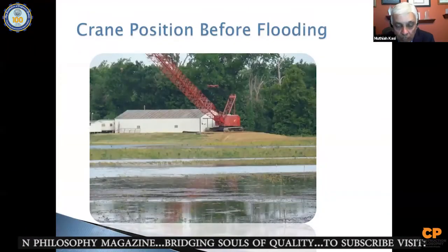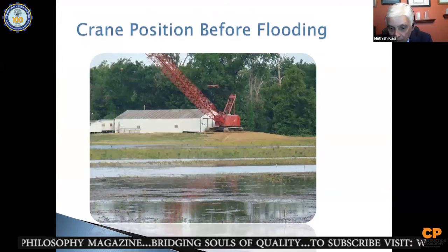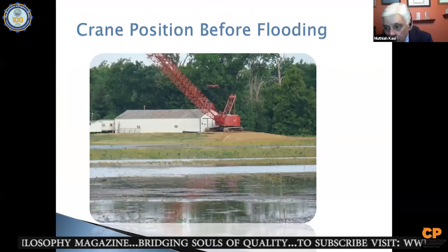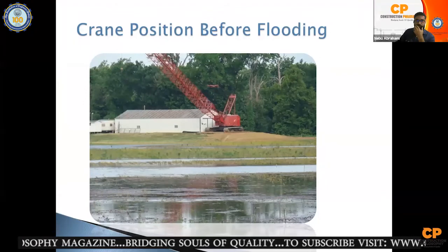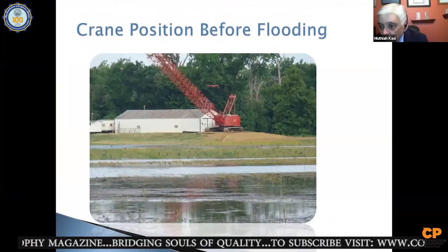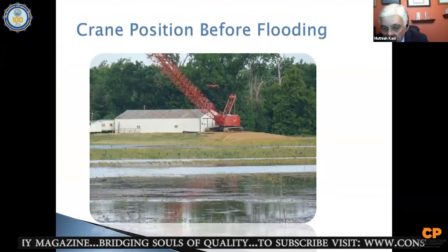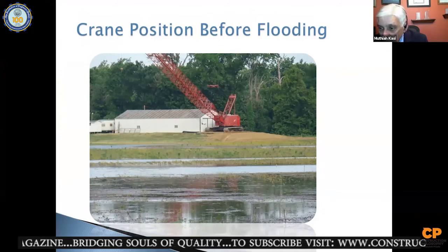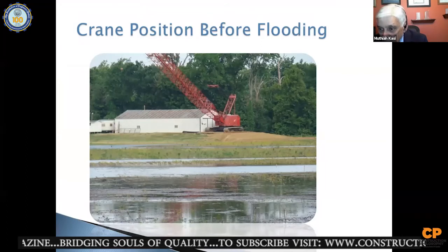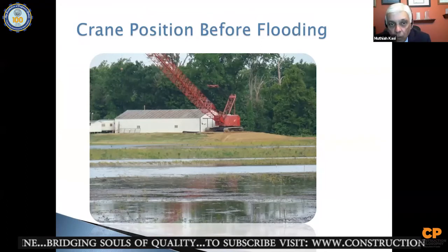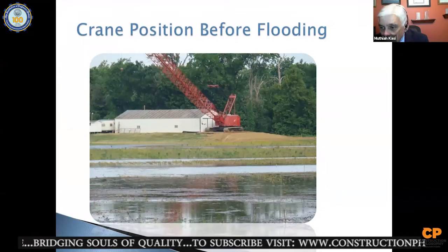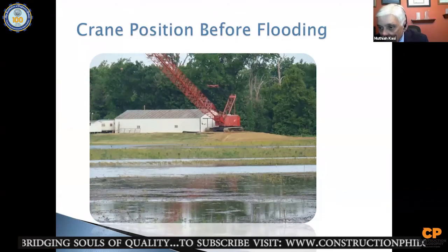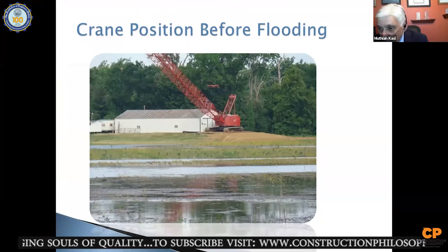When we were designing this particular project, after design was done, we did a value engineering, value analysis. Part of the information phase is we looked at the last 10 years, this is over a river. We looked at the river's point of view, how this river behaves. So then we adjusted our unit cost, knowing the contractor knows this, he's going to have a risk avoidance or risk mitigation cost. We included that cost in the project.